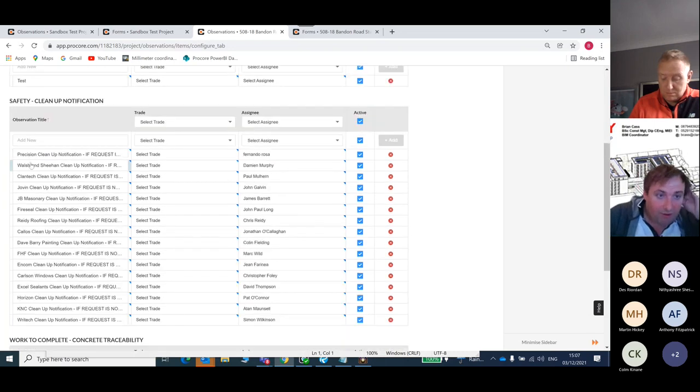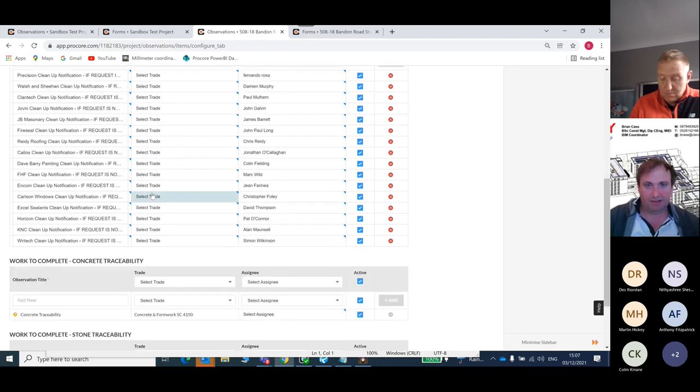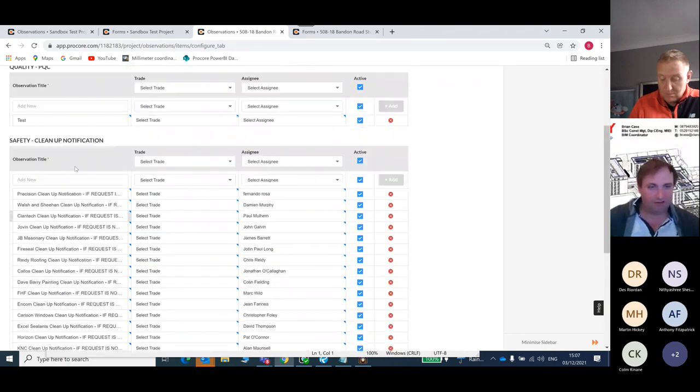So we have 1, 2, 3, 4, 5, 6, 7, 8, 9, 10, 11, 12, 13, 14, 15. So we've 16 contractors, and all we've done is that statement, clean up notification: if requested, it must be complied with in full within 24 hours, other than that contract charge is applied. And we just put the name of the company in front. So that's the kind of preparation work that you should try and do.